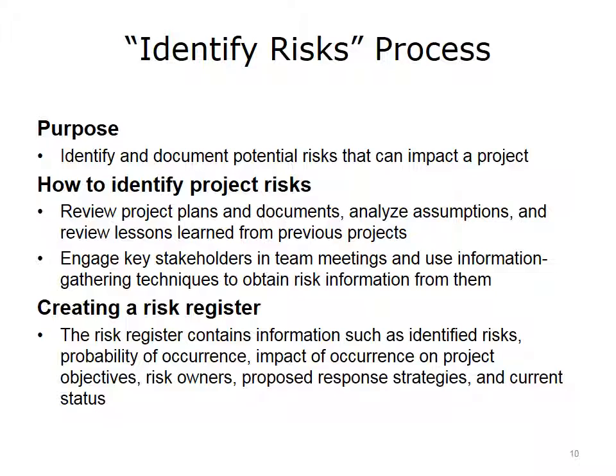You may want to conduct focus groups or interviews to gather this information. The risk register contains information that you have identified, such as: What are the identified risks? What is their probability of occurrence? What is the impact of occurrence? How does that impact different project objectives? Who are the risk owners? What are the proposed response strategies for the risks? What is the current status of each of the response strategies? The register is monitored throughout the life of the project and updated continuously as new risks are identified or there are changes to current risks.